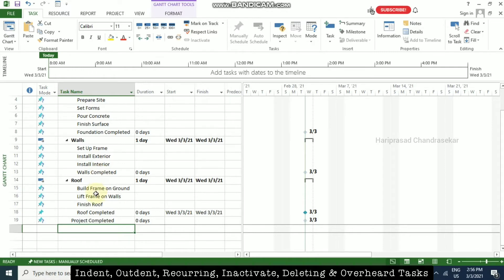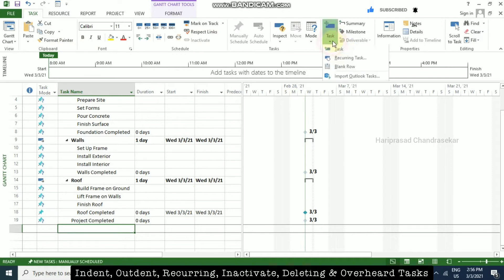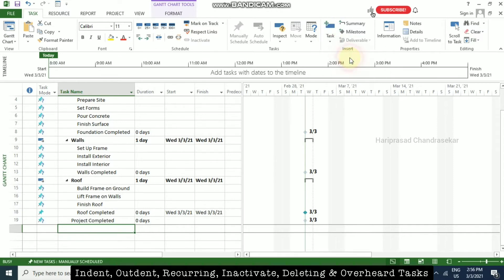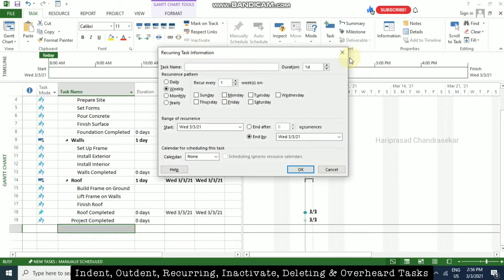To insert a recurring task, go to the Task ribbon and in the Insert option you have a Task drop-down. When you click the drop-down, you also have 'Recurring Task'. Click that and you can put the name of the recurring task — for example, I am going to put 'Status Meeting'.